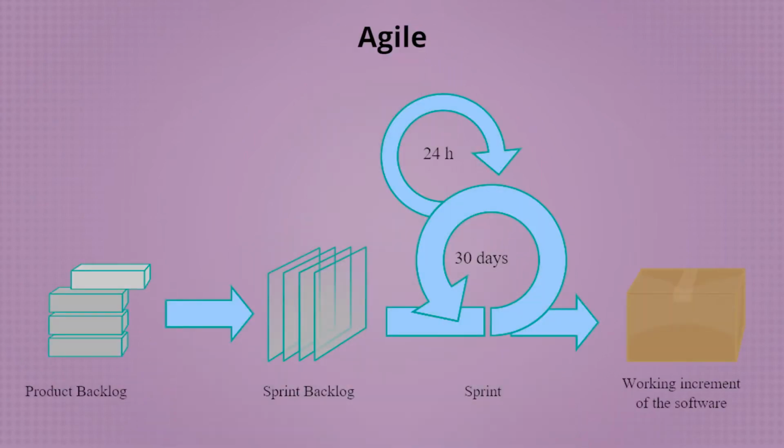Now, with adaptive approaches, a software product is delivered within a time-boxed iteration. That time-boxed iteration can also be known as a sprint. So at the end of every sprint or iteration, again, there's an increment of value which is potentially shippable. And that's really important to note. That little bit of value could potentially be shipped. In other words, it could be launched, it could be deployed to production. And those potentially shippable increments are known as PSIs.